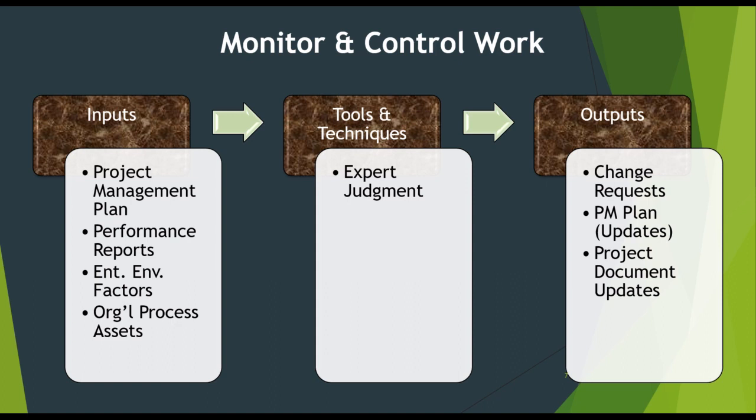Monitoring and control is the responsibility of the project manager to make necessary adjustments related to resource allocation and ensure that everything is going on track. To help this, a project manager may conduct review meetings and get regular performance reports. The inputs for monitoring and control work are: project management plan, performance reports, enterprise environmental factors, organizational process assets. Tools and techniques are expert judgment, and outputs are change requests, PM plan updates, and project document updates.